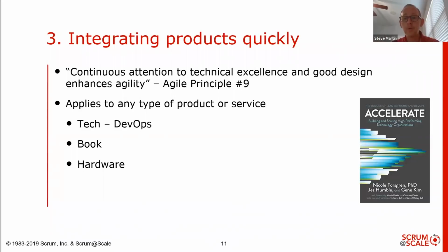By having something that works every single sprint, you know that it works and you've got a certain level of functional quality. From a maintainability risk perspective, you know that you can alter one part of the product without impacting another part of the product and move things faster. From a customer risk perspective, if you've got a product that's constantly integrated, they can look at the entire product and see how it's going to help solve their particular problems.